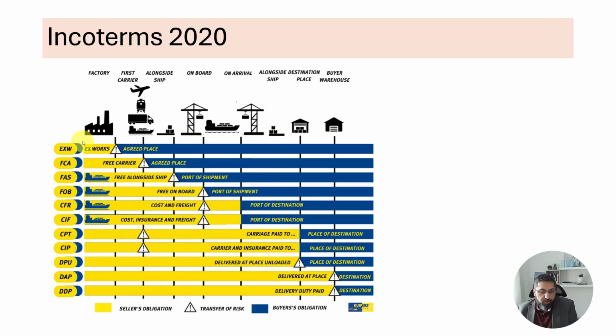You may have to go inland and say, okay, I'm going to add up all the transportation expense to the supplier price until the goods arrive at my warehouse or my distribution center or my factory in the US. And now I can compare apples to apples on what it'll cost me to use any supplier. Some of the suppliers who are really cheap on the unit cost may drop out or may end up becoming more expensive because they're in such a location from which the transportation is very expensive to get it to your factory.